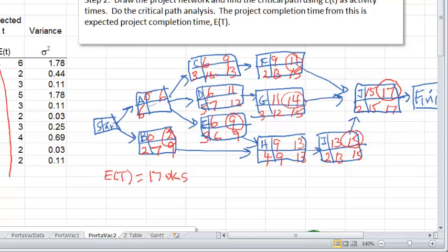So here it looks like this is 10, right? That's the 10, 7, and 6. 3 values to choose from, and remember we choose the smallest number, the 6. Then minus 6 is 0. So that's it. That's the end of the backward pass.